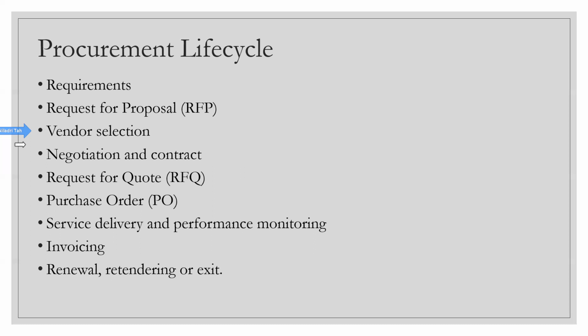You would be having some factors in your mind on which you are going to do the primary filtering. The factors can be the experience of the vendor, number one. The factor can be, is the vendor doing a similar kind of solution in the similar market space where your company stands? Maybe your company is in the retail market space or e-commerce. Then you have to find out, is the vendor doing a similar kind of service to, let's say, a company in India called Flipkart? Are they doing a similar kind of service to a retail company in India, which is also almost a very big name compared to Amazon in India, right? So these can be your filtration points.